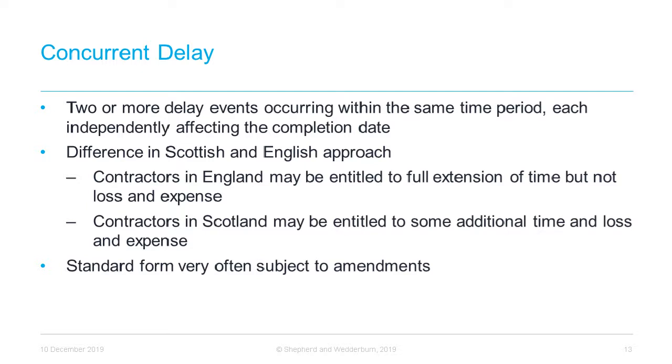It should be noted that this is an area where the standard form is very commonly amended. For instance, parties may insert provisions in relation to what constitutes concurrency, guidance as to the identification of the dominant cause and the consequences, and perhaps the insertion of more favourable terms for the employer. This will now conclude the webinar with a roundup of some of our key tips on management of the programme and time claims.